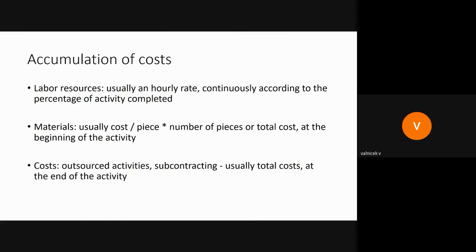The full cost model is based on some internal calculation within the university, and at the end of each year, the university creates the model for each faculty separately and calculates how much their indirect costs are. And surprisingly, the indirect costs are not the same within the university.